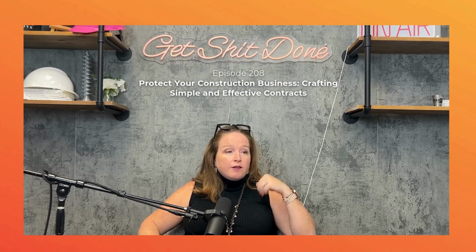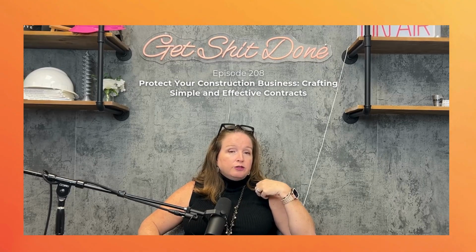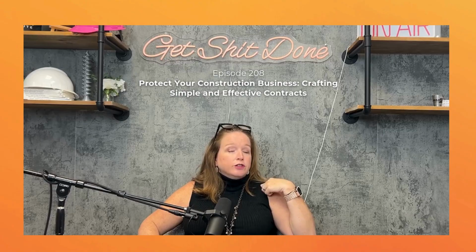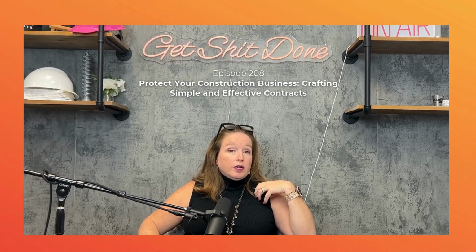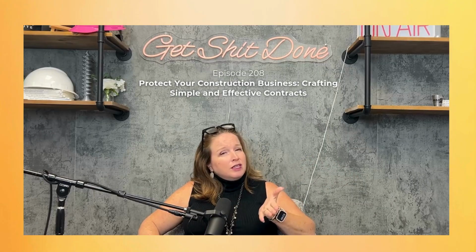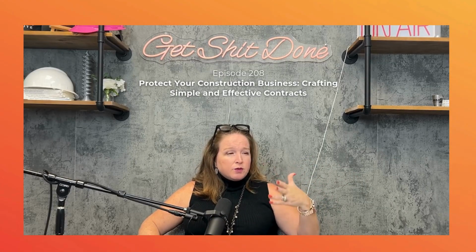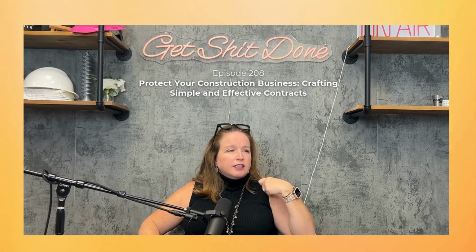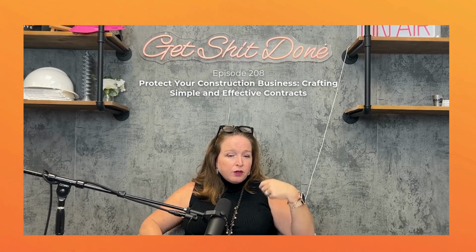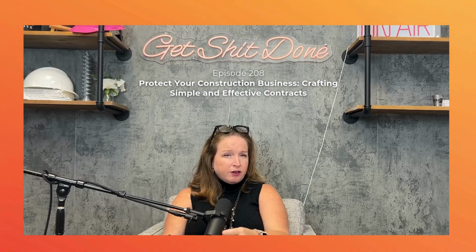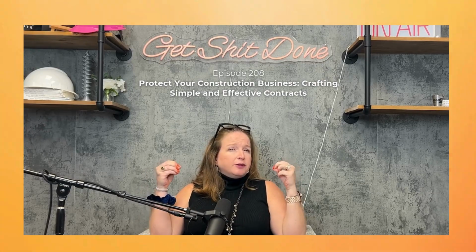And so if you get a deductive change order that you don't agree with, here are some questions you should ask. Number one, get an invoice for who they paid. But not only an invoice, get a receipt, a proof of payment. Because one of the general rules in contracts is that in order to charge somebody damages that you've incurred, you actually have to incur those.